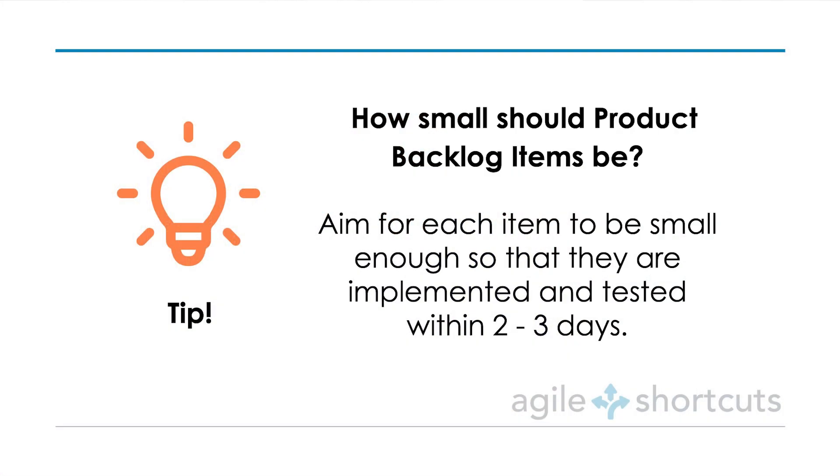Once your team breaks down the product backlog items, how small should they actually be? Personally, when I'm helping teams running two-week sprint cycles, what I like to see is the team break the product backlog items down so that they don't take any longer than two or three days to implement and test. That's generally what I look out for, but every team is different — I would suggest you experiment and find what works for you.